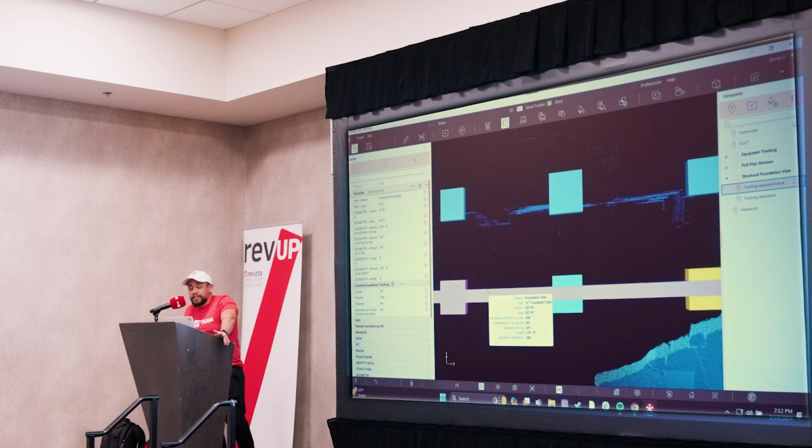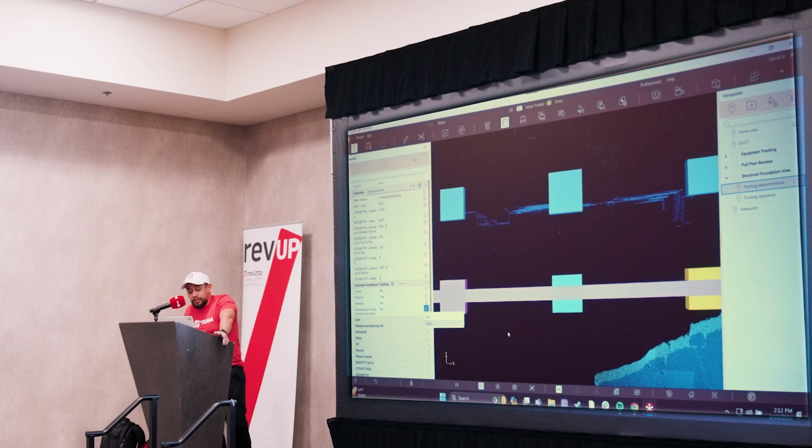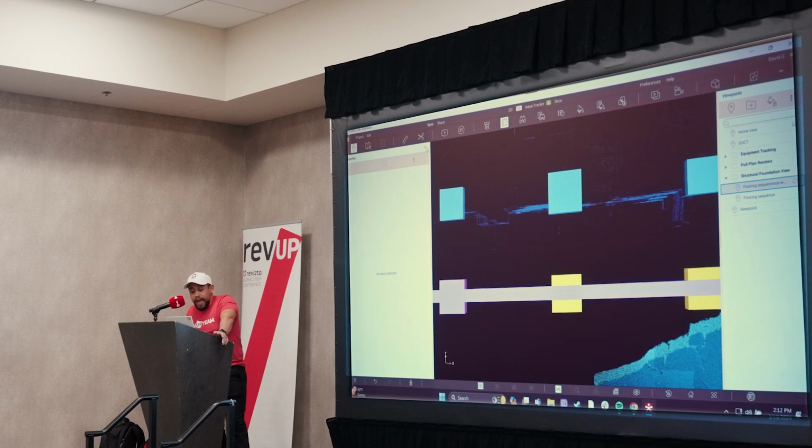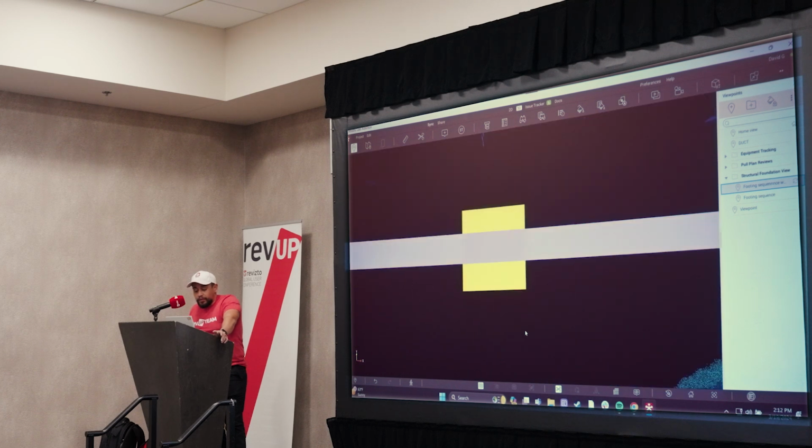So as the field engineer, as I'm out there, I would need to grab that and provide that status. As I change that custom status to a discrepancy, then the rule that applies to my coloring legend will then show against the model. So that in itself is a simple interaction.